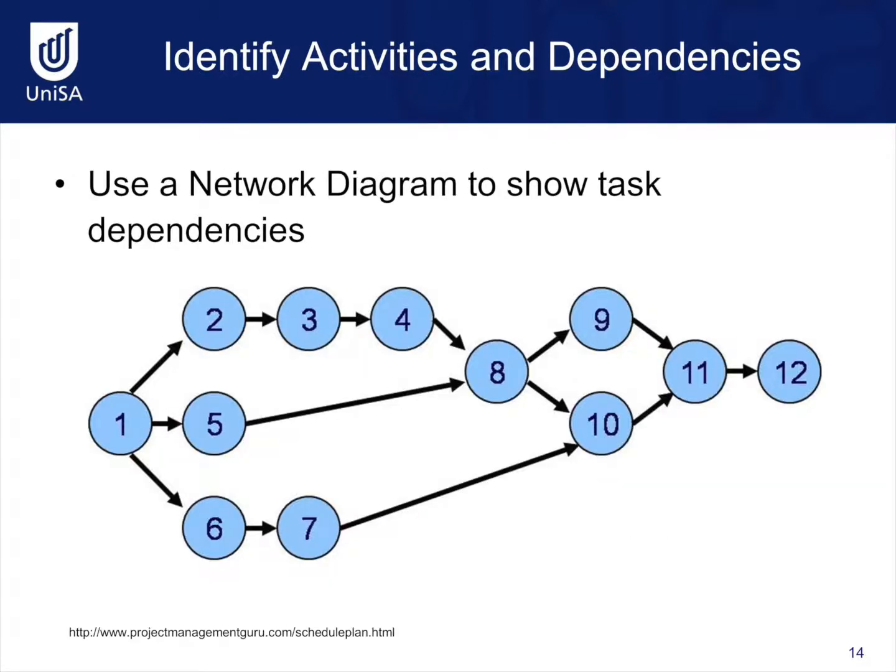At this stage, the activities for a project have been determined, but only identifying activities is insufficient in planning a project. The dependencies between the activities or tasks must also be shown because things aren't always done in sequence, and some tasks may be dependent on the completion of other tasks. These dependencies can be shown with a network diagram.